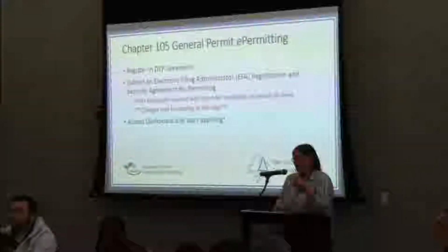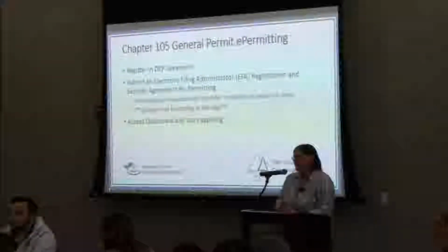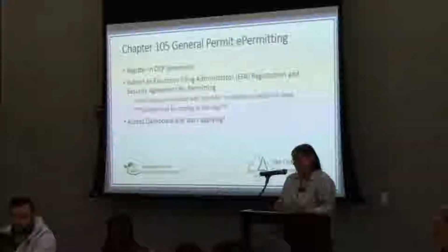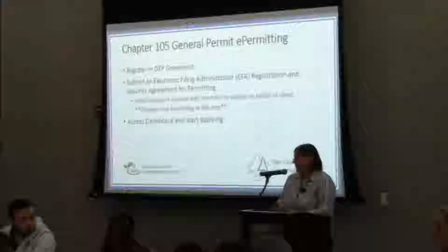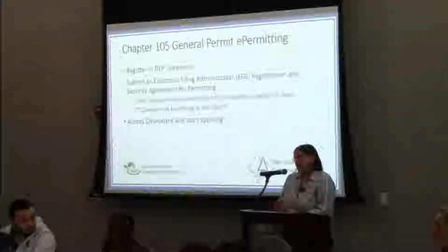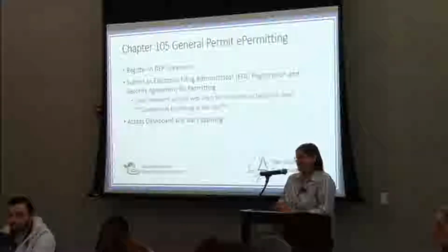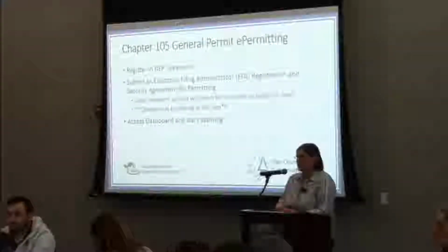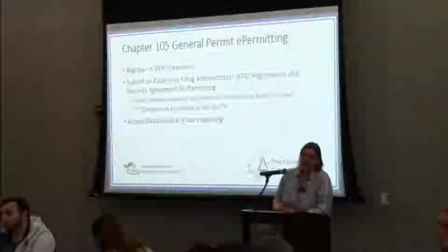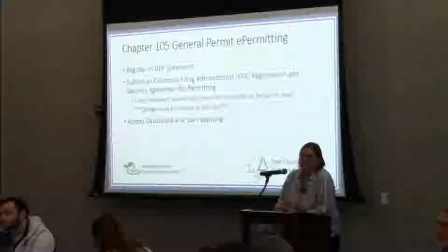This security agreement for permitting and the EFA, the client is also logging on as a user, so the client would be logged into Greenport, and they would then give you authorization to submit on their behalf. So it's a little bit more cumbersome on the front end to work out those agreements. You have to be registered, and the client has to log on too.